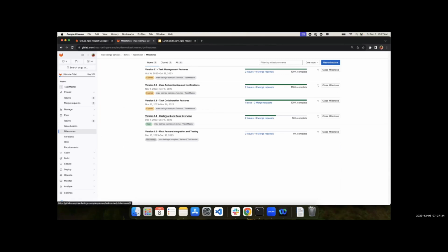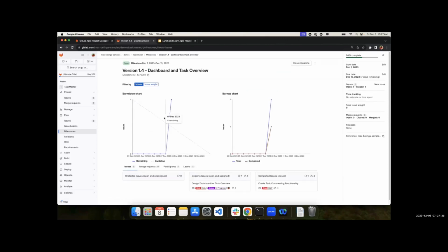Now let's go with this specific time frame. Here you can see what we call burn down charts in GitLab. GitLab burn down charts provide a real-time overview of work in progress within the current sprint. These charts visualize the completion of scope work and they incorporate estimations, typically represented by issue weight or story points, meaning estimated efforts.